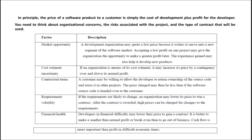This is one strategy: to get the contract, a company may quote a low price, but after getting the contract they can charge a large amount of money for the changes needed by the customer. If more changes are required, the software price may increase. In this way, requirements changes will affect the pricing of the software.